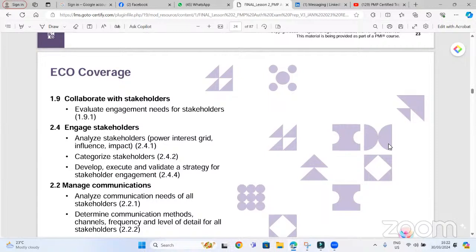With some stakeholders, you might need to communicate the project status report on a weekly basis. With some stakeholders, you need to interact to get buy-in, like support in case of any risk or issue. You need to escalate to top management upward. And we discussed that the influence of a PM is in five directions. It is upward with the senior management. It is downward with the project team. Horizontally, he or she communicates with peer project managers. And then they also communicate with external suppliers, contractors, and vendors.